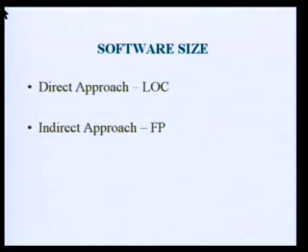Software size is usually measured in two approaches. One is the direct approach, the other is the indirect approach. In the direct approach, you will be using the lines of code, meaning how many lines your program is going to contain. So you are thinking of LOC at the level of project planning itself. You see the problem here.